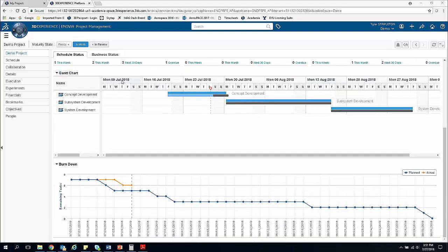I have a simplified Gantt chart here that is showing the phases of my project and my completion level of each project. Looking at it, each of these phases here is shown with 2 bars. I have today's date marked on this plot. The first bar here, this middle shade, is the planned duration of the concept. I have a darker bar that's showing the actual expected duration of this phase. Notice that based on my current progress, it's expecting this phase to take a little bit longer than I had planned, so I might have to increase the amount of effort I'm putting into my concept development.